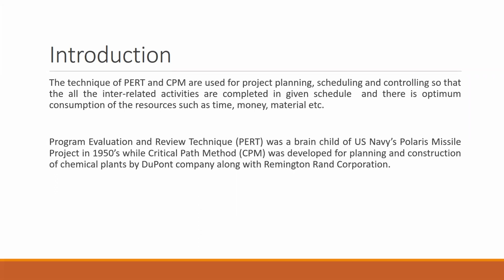So let us see those common features. The first and the most common feature is that in both the cases, whether it is PERT or CPM, the first thing we need to do is construct a network diagram, which is the main step of both the techniques. It involves various activities when we draw the network diagram, and the scheduling, or the time, which is allotted for each activity that is represented in the network diagram.